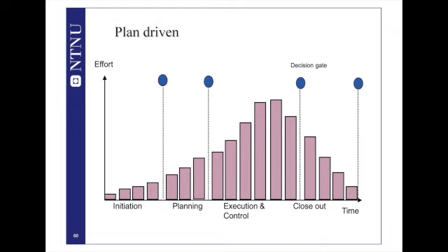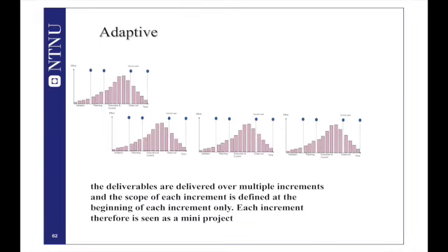Actually, this is a challenging problem: how to make sure that the customer or the end users are involved throughout the project lifecycle. Maybe they don't want to, they don't know how, or it is very difficult to come to a common agreement during this process. So this is, in general, the plan-driven approach. It is demanding. It requires a lot of involvement. It has lots of uncertainty. The cost of change increases as we move forward.